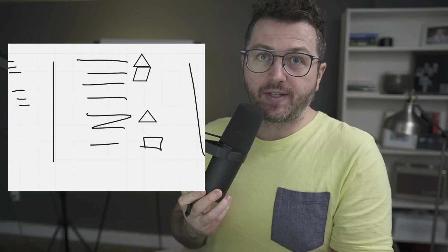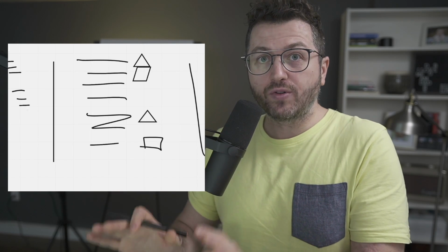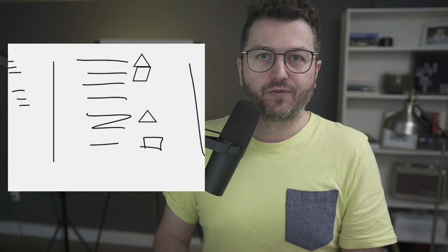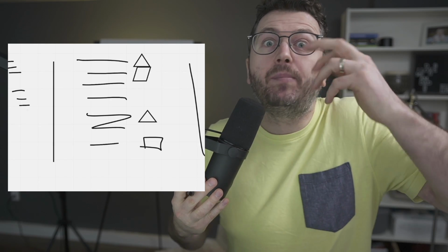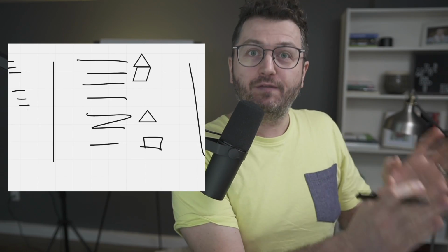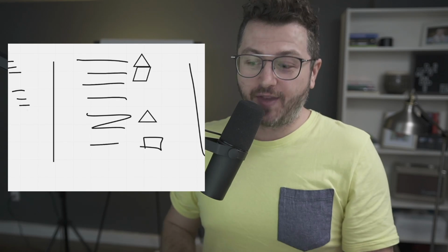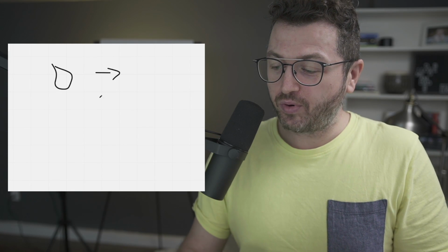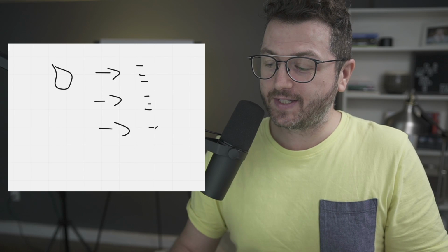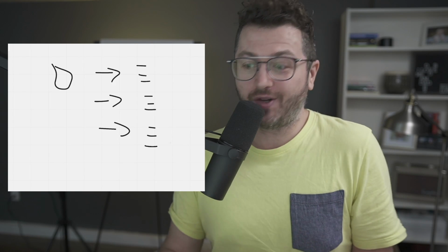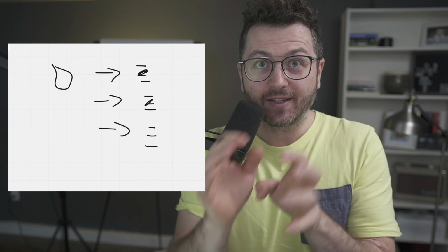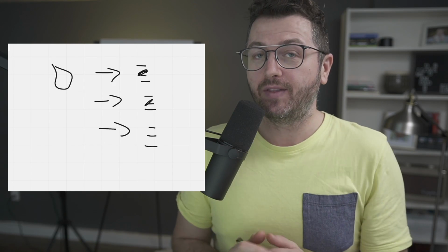Now, if you have issues with this, if you're not following a process like this, it's probably wasting a lot of your time. It probably brings frustration for your developers. I've seen companies that actually duplicate the tasks in a different view so that the developers know the order they go in, because the only thing they have is this kind of view. Or they have something like project 1, project 2, project 3 with all the tasks, and they don't know, okay, which one should I do first? This task from here or this task from here? Because the tasks cannot be ordered amongst the projects.